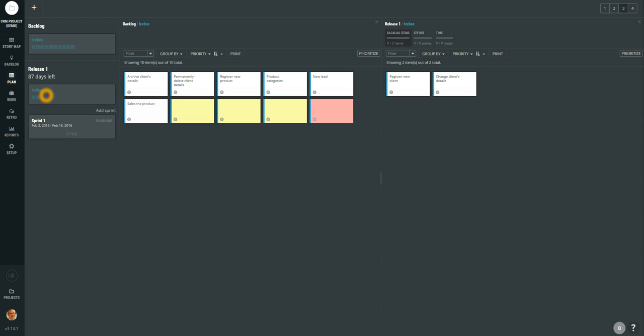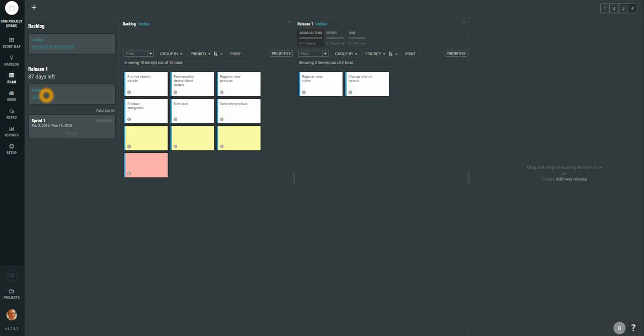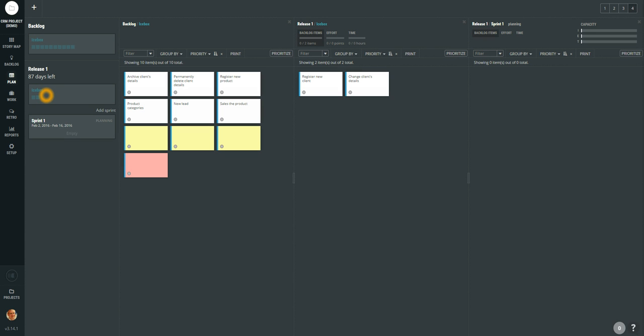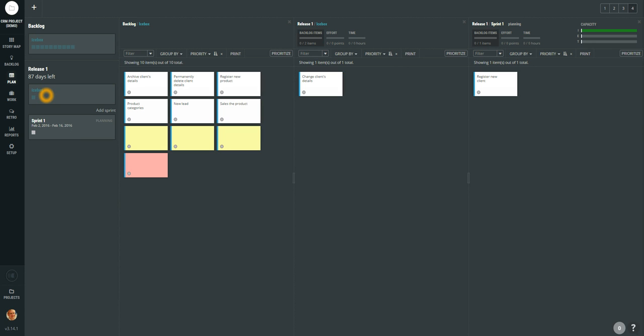Now we wish to plan some user stories from that release into a particular sprint. What you can do is display the fourth column and drag a sprint there. And just drag the card to the sprint.